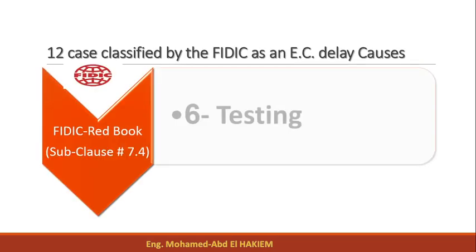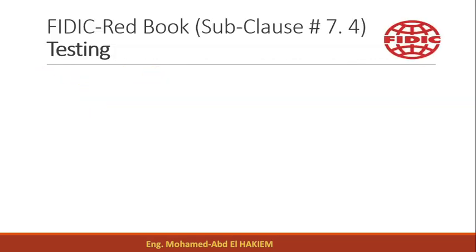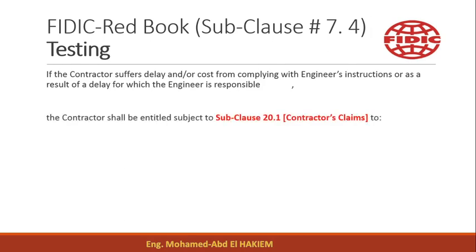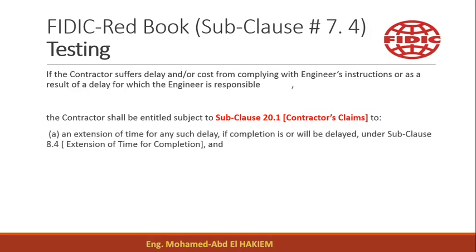Cause 6 – Testing. If the contractor suffers delay and/or cost from complying with the engineer's instructions, or as a result of a delay for which the engineer is responsible, the contractor shall be entitled subject to subclause 20.1 (Contractors' Claims).